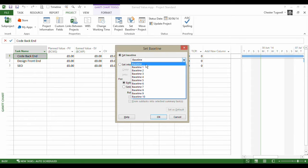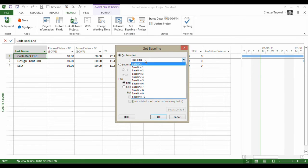You will notice you can set more than one baseline. That's because you might set an initial baseline after you've done your initial set of planning, and then 12 months down the line, six months down the line, you might want to set another baseline to capture another set of values at that point in time.